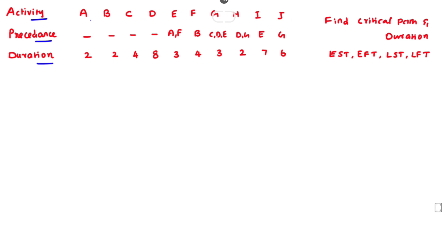For example, activity E should start after the completion of activities A and F. For activity J, it will start after the completion of activity G. Likewise, the precedence relationships are given for all activities. The corresponding durations are also given — activity A has a duration of 2 days, activity B also has a duration of 2 days, and likewise every activity has its own duration.